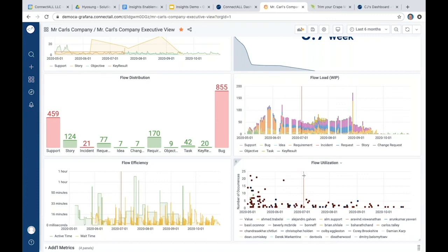And the intent here is not to get anybody in trouble or anything of that nature. But the idea is to understand, do we have bottlenecks? Are we assigning all of our work to Brett and overloading Brett, where other team members maybe don't have enough work, and allow us to plane out that workload so we're taking full advantage of all of our resources? Or maybe you don't want to do it by resources, maybe you want to do it by team, we can do that as well. But again, the idea is to flatline that so that we don't have bottlenecks on one person or one team, but we're planning that out, that we're getting full advantage of all of our resources.